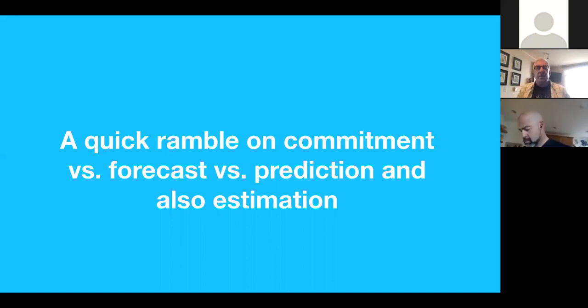And there was a metric, and we'll end up talking about that a little bit later too, about how many stories the team started but never completed during the sprint, and also a metric about how close you were. I forget if it was called work not done, something like that. We committed to 8, we did 6, so we got a 75% or something like that.